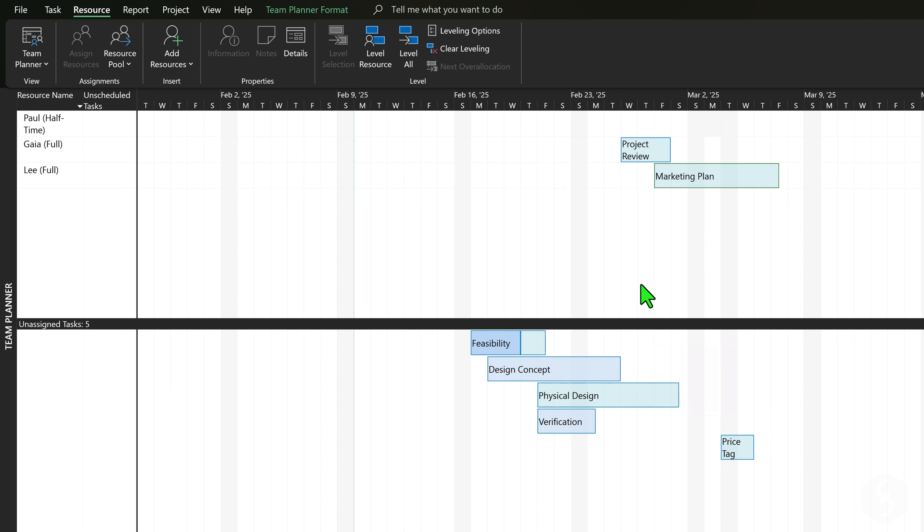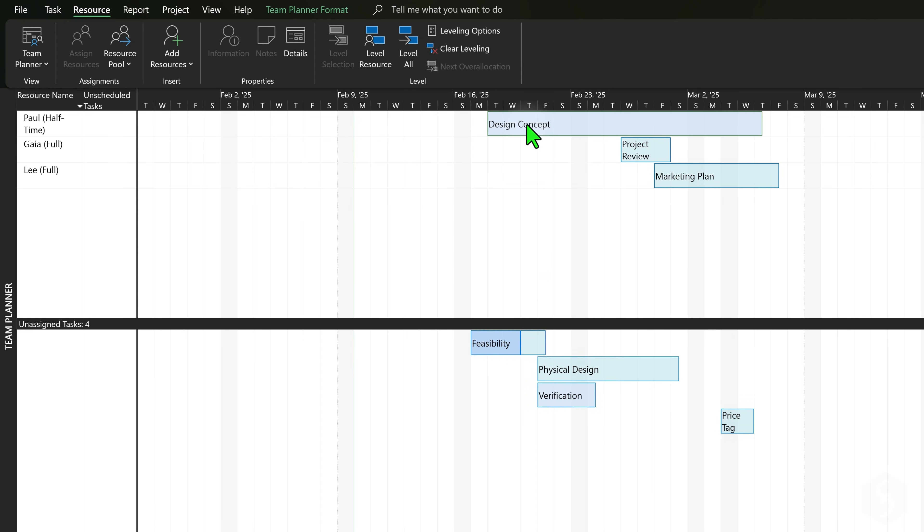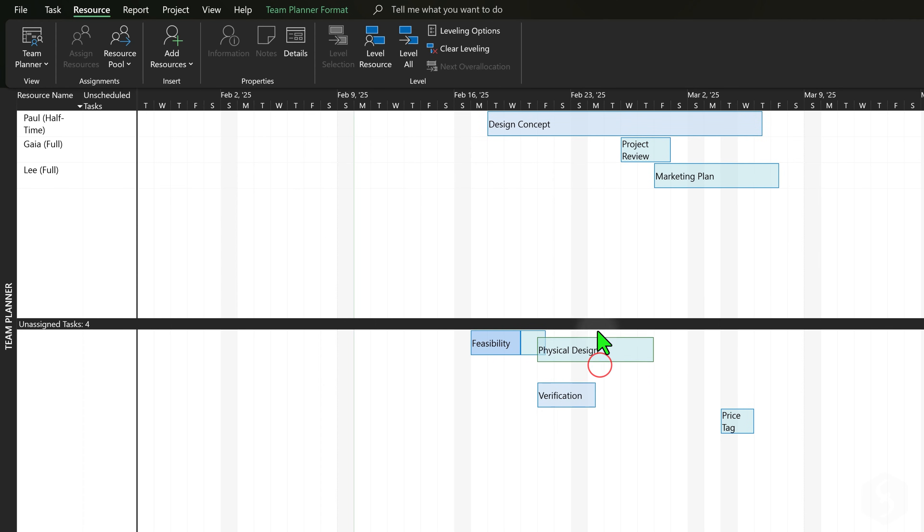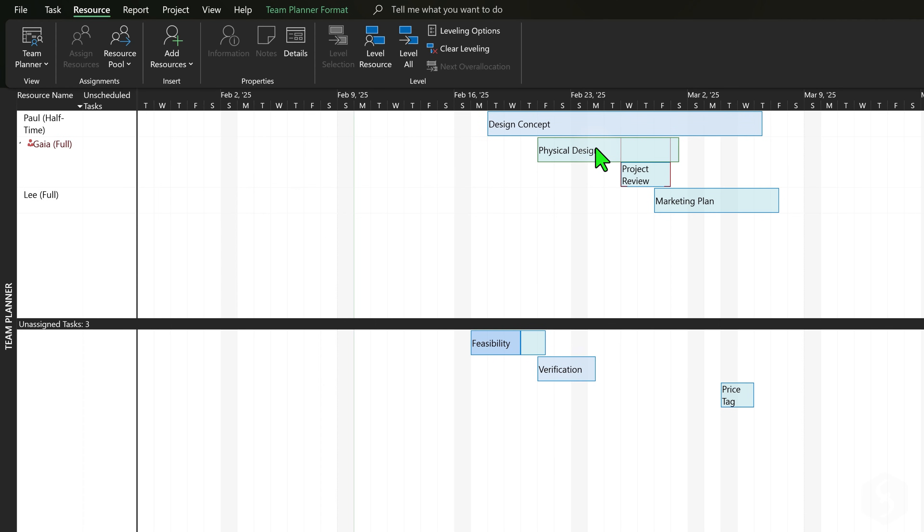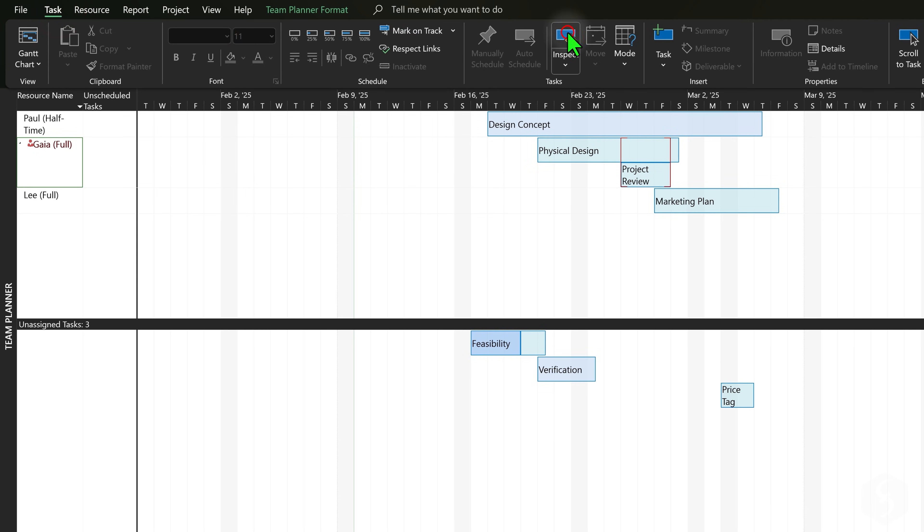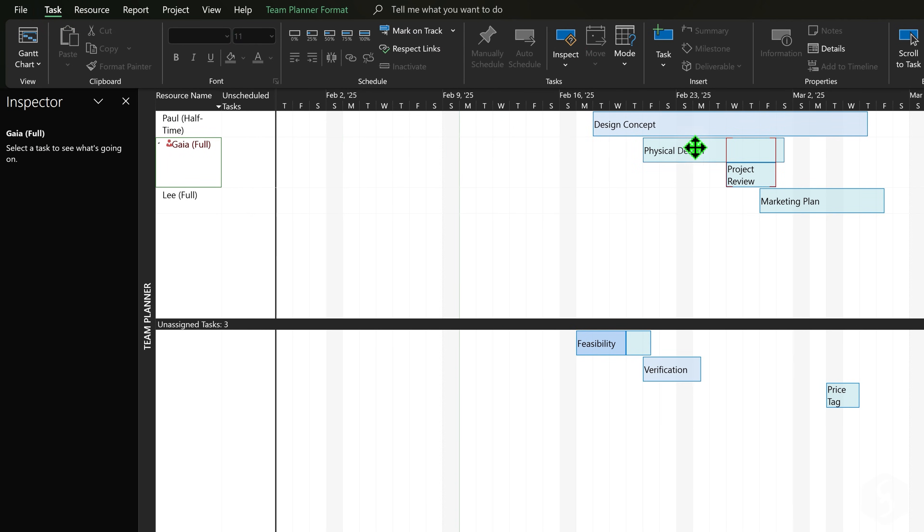While assigning auto-scheduled tasks, Project automatically adjusts the task based on the resource availability. For example, the task gets extended if the resource does part-time. When assigning manually scheduled tasks, you have to check violations on your own, getting help from the Task Inspector.